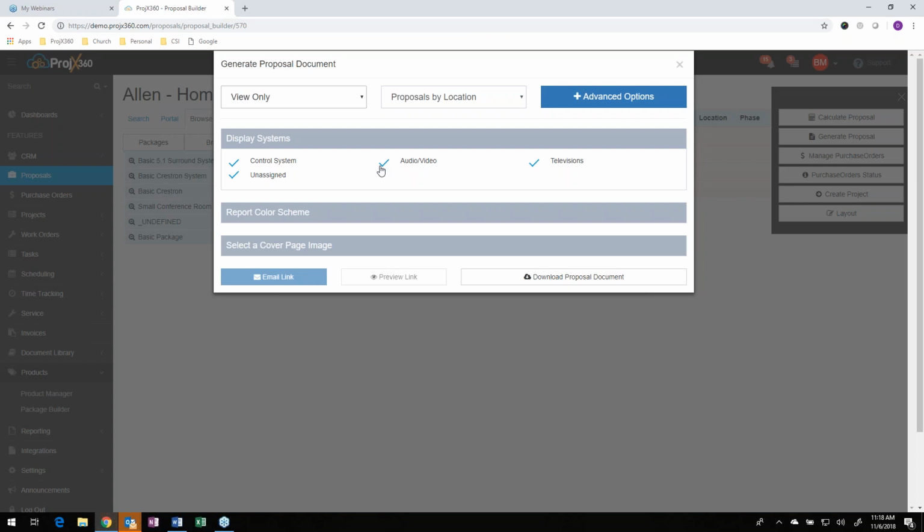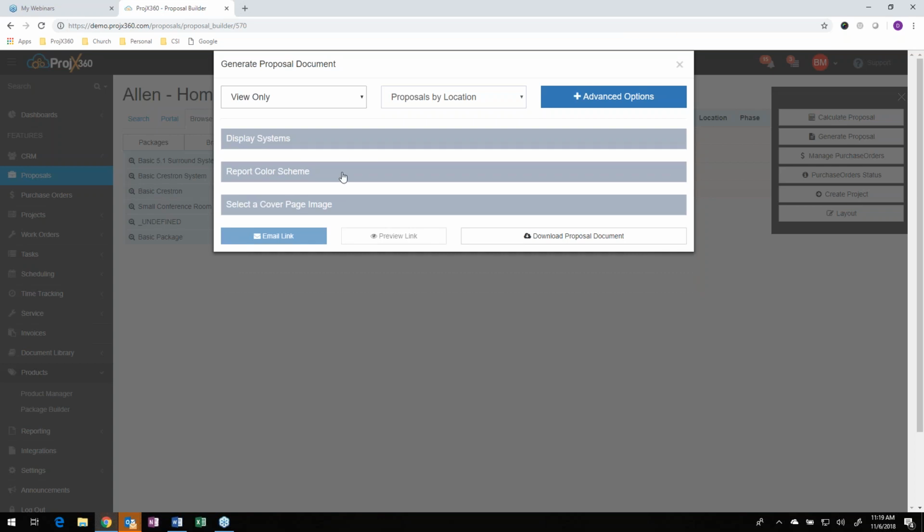I break it out by control system, by lighting control, by motorized shades, all that kind of stuff, just to show them the overall detailed breakout, instead of one big lump number. Especially with televisions, you might have 15 TVs in a job totaling $40,000-$50,000, and the overall job's only $120,000, and they're like, oh, the Crestron system's way expensive. Well, remember, I want to point out to that client that $50,000 of this is televisions that you're going to go pay at Best Buy too. So that's what I can use systems for.